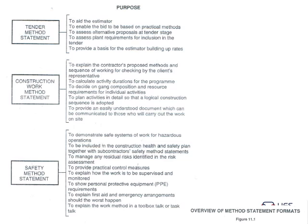I like to use diagrams because they contain a lot of information and are logical to think about. For tender method statements, the purpose is to aid the estimator to make an estimate, enable the bid to be based on practical methods, assess alternative proposals at tender stage, assess plant requirements, and provide a basis for the tender estimator.